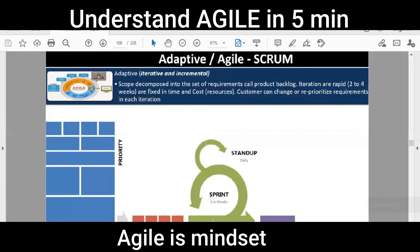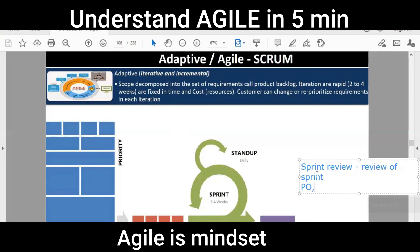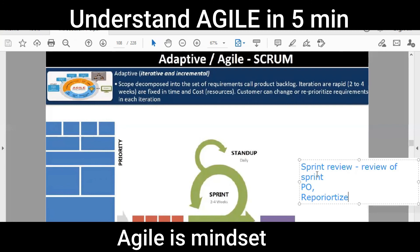At the end of two to four weeks, the sponsor, product owner, and team come together and discuss what has been made and what hasn't. This meeting is known as the sprint review. The product owner, sponsors, and client all come to see what was delivered. They then reprioritize the items in the product backlog, since priorities may have changed during the sprint.